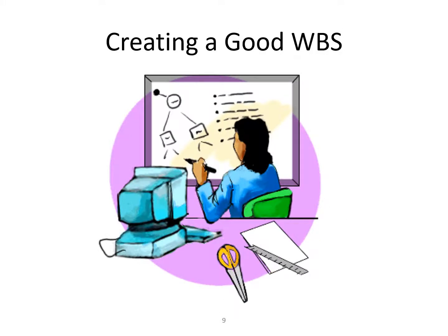It is difficult to create a good work breakdown structure. The project manager and the project team must decide as a group how to organize the work and how many levels to include in the WBS. It is often better to focus on getting the top levels of the WBS done well to avoid being distracted by too much detail. Many people confuse tasks on the WBS with specifications or think it must reflect a sequence of steps.